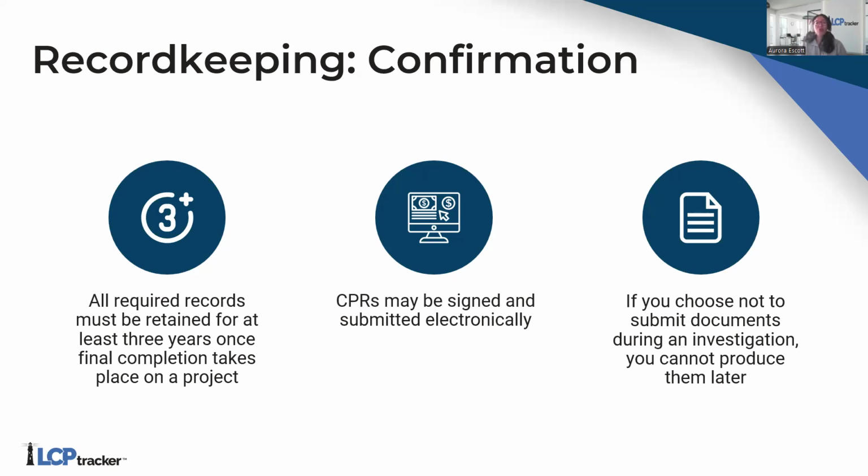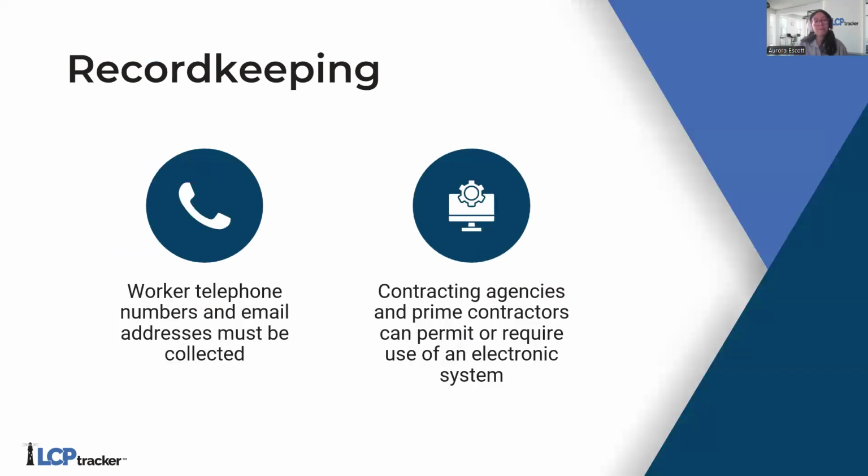If you choose not to submit documents during an investigation early on, then you cannot produce them later. So make sure that when an investigator requests certain backup documentation, you are as open and transparent as you can possibly be and submit your documentation early and on time.